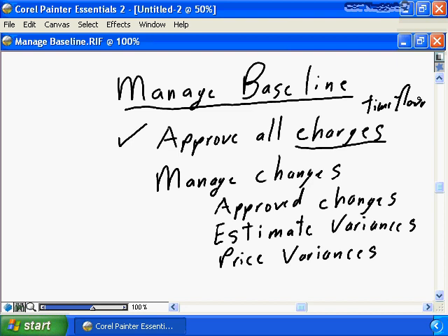Therefore, your cash management plan says, for this month of my project, I need to be prepared to spend $20,000 for this material. And you look at your accounting sheets at the end of the month and the charges aren't in there, you need to go looking for it to ensure that the invoice has been received.